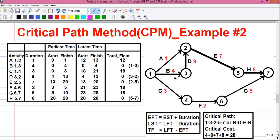Similarly, activity B requires 4 weeks to complete. Activities A, B and C are called starting activities because they are starting from the starting event. Also, starting activities don't have any predecessor activity — that means there is no activity preceding them. To know more about predecessor activity, do watch my previous video on Critical Path Method, video 1.